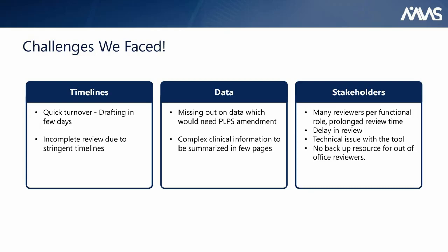At MMS, we face many challenges. When we started working on PLPS, we faced many challenges. We have listed few of them for you. Firstly, it had a quick turnaround. We had very few days for drafting. Another challenge was to summarize complex clinical information in few pages. Team review was incomplete due to stringent timelines, because of which data was missed, which led to PLPS amendment.